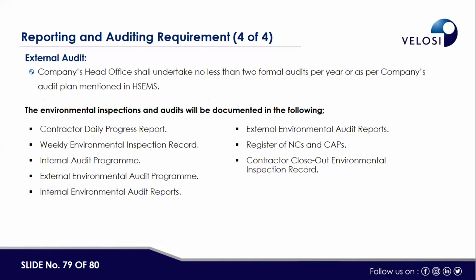And then the external audit that the company head office shall undertake: no less than 2 formal audits per year. It means that a biannual audit was proposed in this management plan.